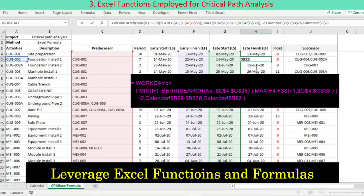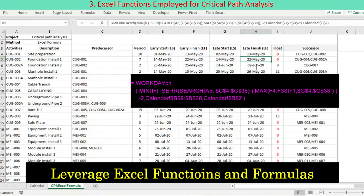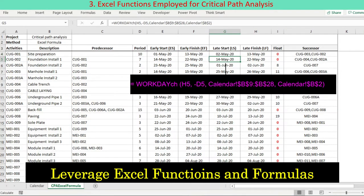One custom function is developed as the replacement of the Excel Workday function. The custom function is named WorkdayCh, included in the downloadable workbook. Weekend is selectable — either one weekend day, two weekend days, or no weekend. Start date is included in counting the period.